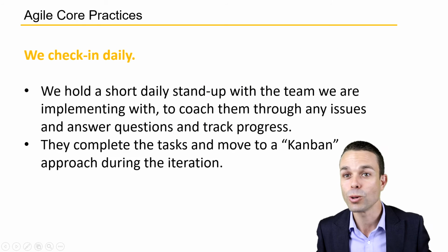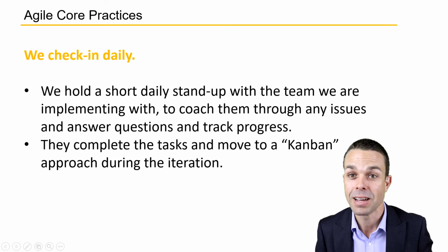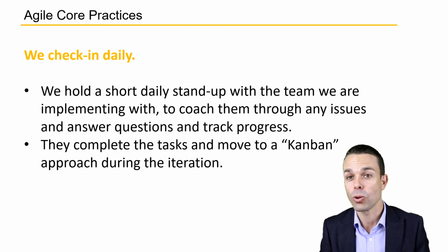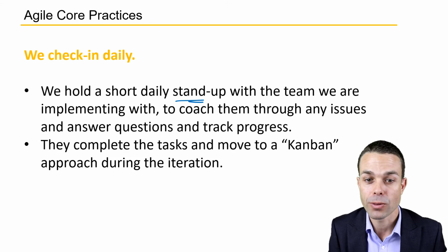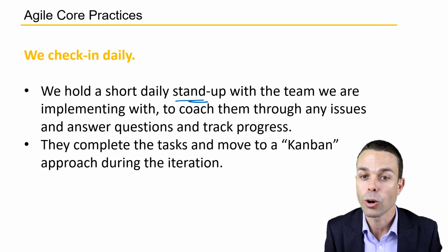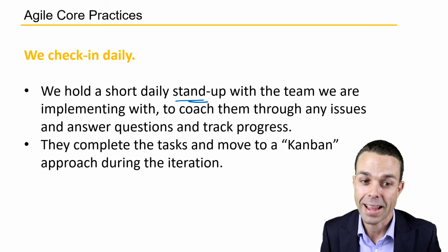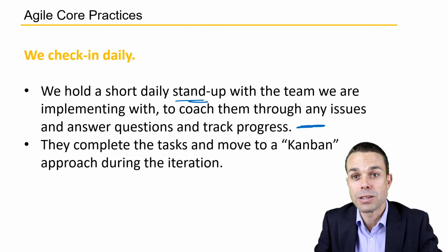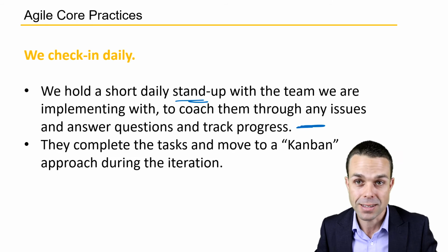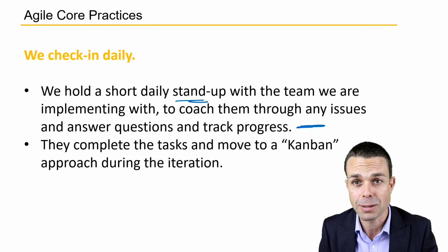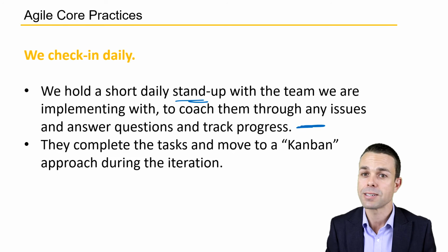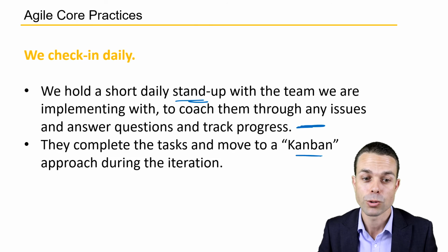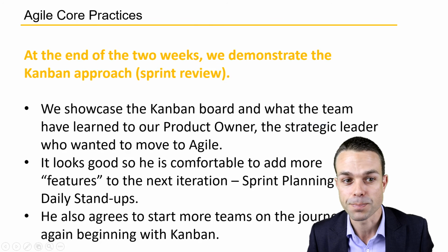Now, of course, we want to check in daily with that team to see how they're going. We hold that short daily stand-up with the team that we're implementing with to coach them through any issues, answer questions and track their progress. We want to keep the momentum going over those 2 weeks as they're moving towards this first baby step of Agile. And they complete the tasks and ultimately they move to a Kanban approach during the iteration.